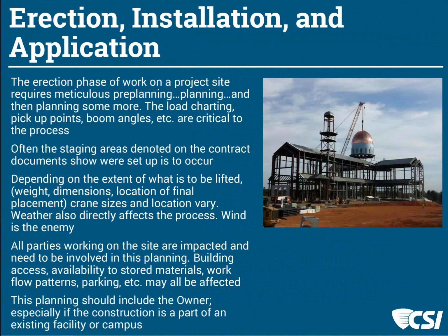This dome had been under construction on the ground for about 4 months. The contractor decided that it would be less expensive and more expeditious to build the dome on the ground and then pick the dome up and set it on the building.